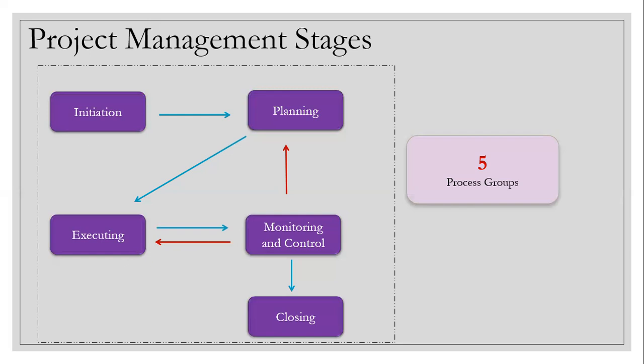Then you put those activities in an order, sequential or parallel. Then you find the dependencies, get into the network diagram, then the critical path, and finally you make sure the schedule is developed for the project, right? So if your scope itself is not correct, it will definitely result in an incorrect schedule.